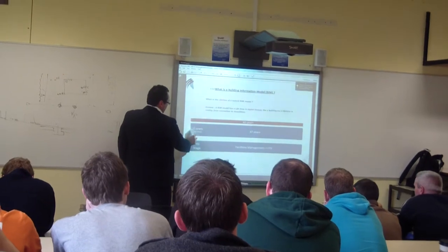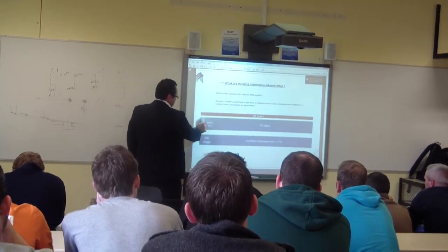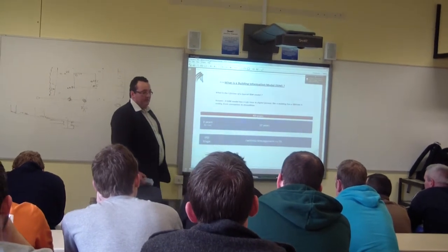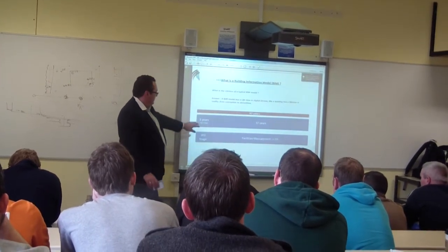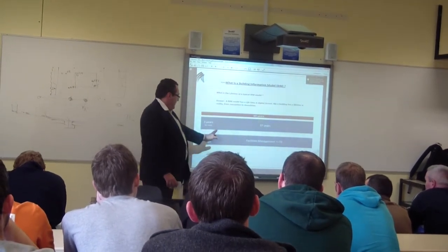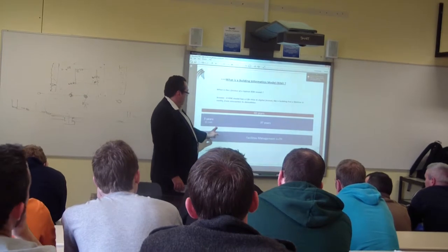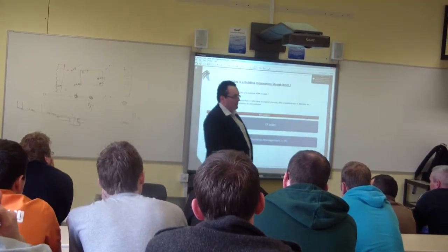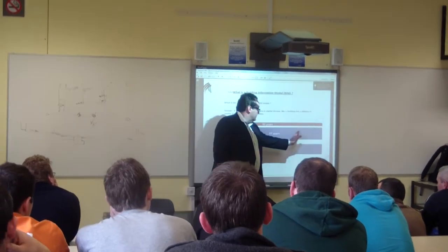So here's, say, day zero here. Start off there. 3 years to build a normal project. Some buildings you could build in 18 months. Around 3 years, I say, engineering, procurement, construction. And then handover, that line there means handover, okay? And you have 37 years there going on, right? And that is where life cycle is, okay?